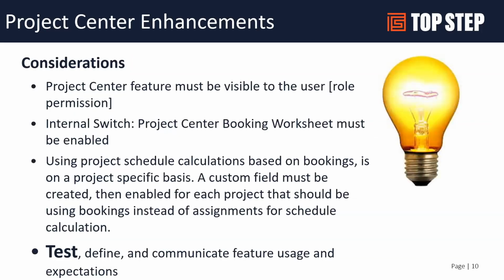So there certainly are some considerations if you're deploying the Project Center and focused on the enhancements to it specifically. The Project Center must be visible to the user, so it's a role permission. There are switches that need to be enabled to make this possible within the system, so those need to be requested from OpenAir support. And then really big with this one is the project schedule calculations, to have them based on bookings.